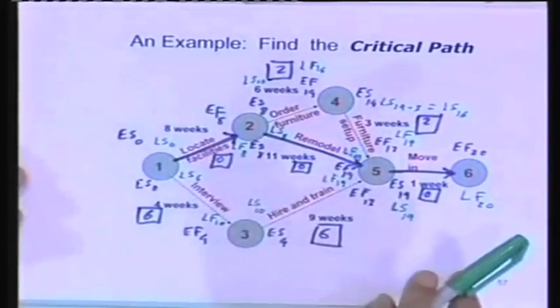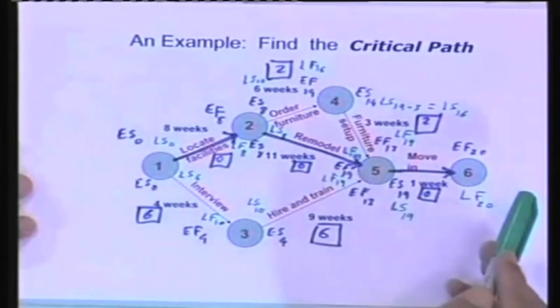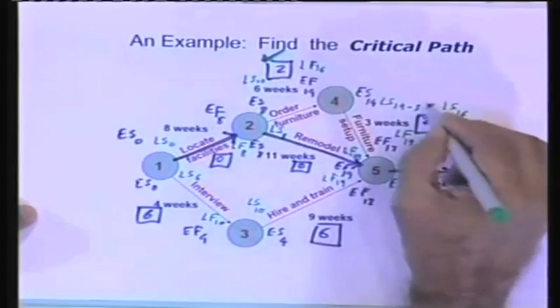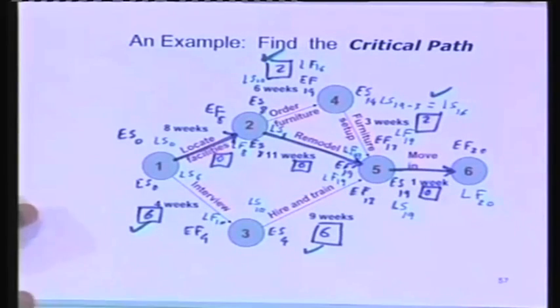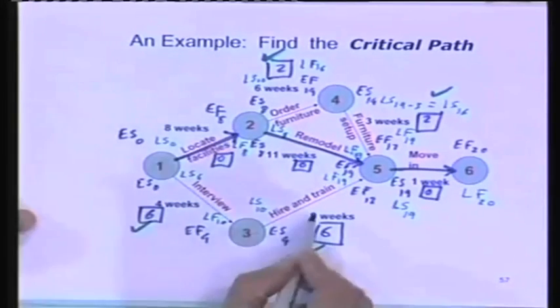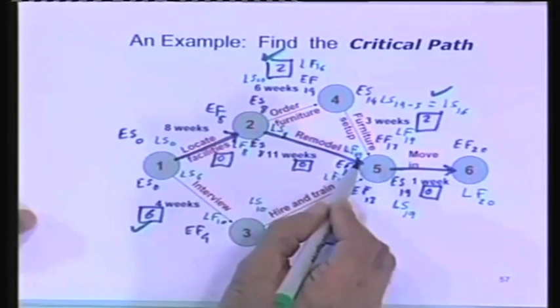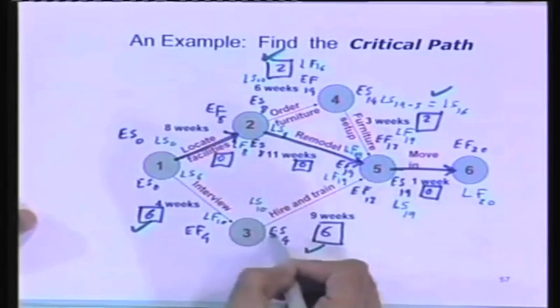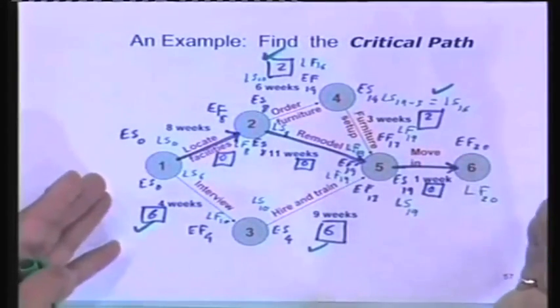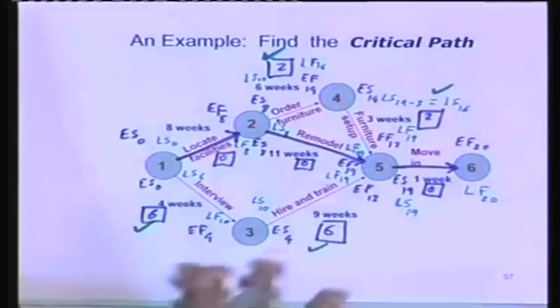This diagram here basically tells you how the project is going to progress. Now you find that there are certain tasks, this one, this one, this one, and this one. They have some non-zero slack. They may have spare resources. And you could swing that resource to this task, and to this task, and to this task. And thereby you could speed up some of these tasks and probably get it done in 18 weeks or 19 weeks, something like that, without spending any extra money.